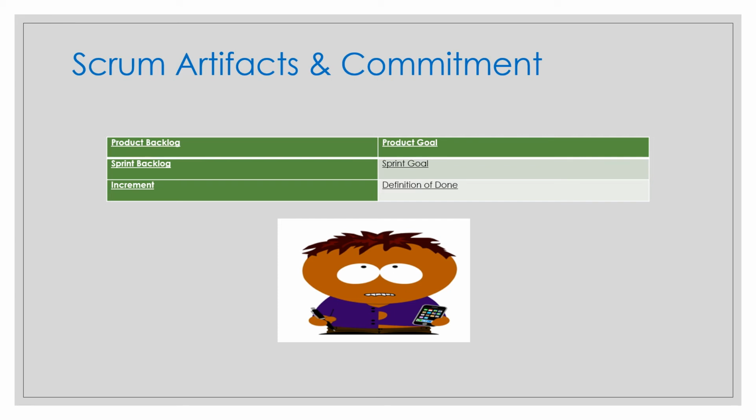If there are multiple Scrum teams working together on a product, they must mutually define and comply with the same definition of done. If you have one Scrum team, the Scrum team will take the decision. If you have multiple Scrum teams, then they will mutually define that DoD. The DoD should be the same for the final product across the entire multiple Scrum teams, and dependency should be less on that.